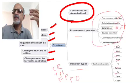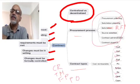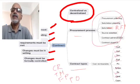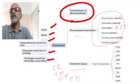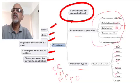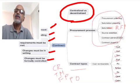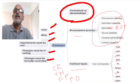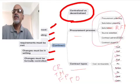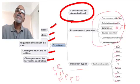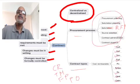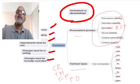Then there is CPAF, cost plus award fee, where the buyer gives some advance to the seller. And cost plus percentage of cost (CPPC) — primarily used with architects, where the architect gets maybe two to three percent of the project cost. In some countries this is banned or illegal, because the incentive for the seller under CPPC is to increase the project cost in order to make more money, which does not protect the interest of the customer.